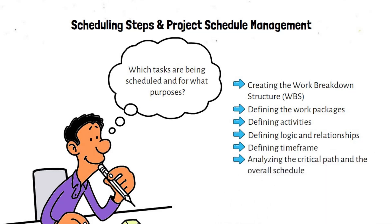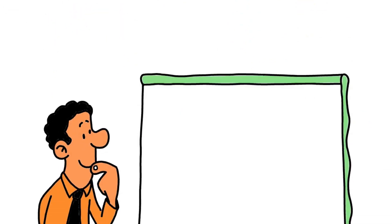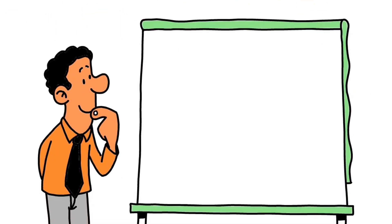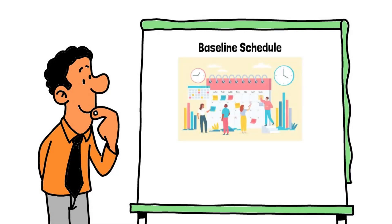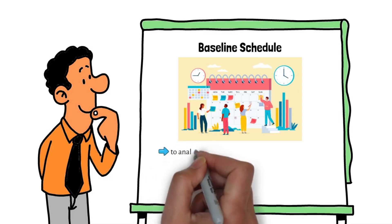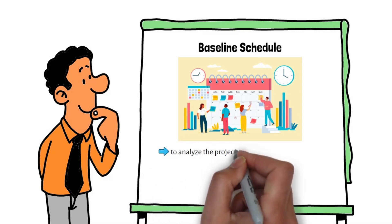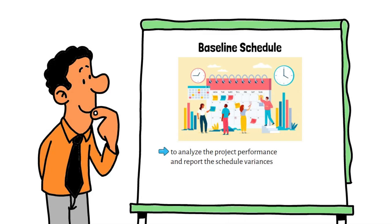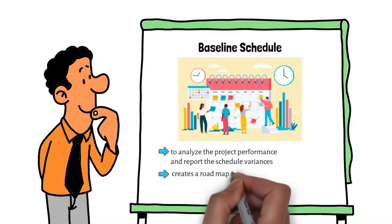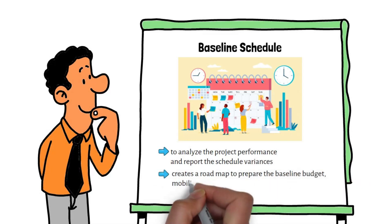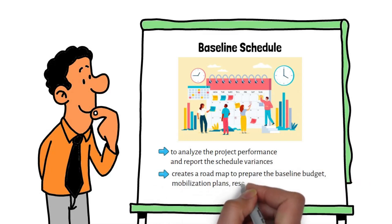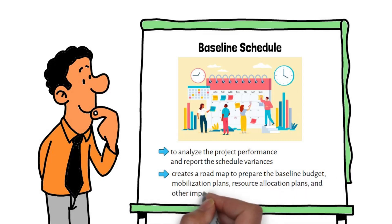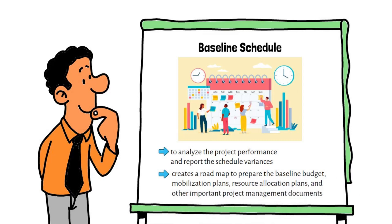A baseline schedule is also known as a schedule baseline or target schedule. It is an approved copy of the project schedule that can be used to analyze project performance and report schedule variances. The baseline schedule creates a road map to prepare the baseline budget, mobilization plans, resource allocation plans, and other important project management documents.